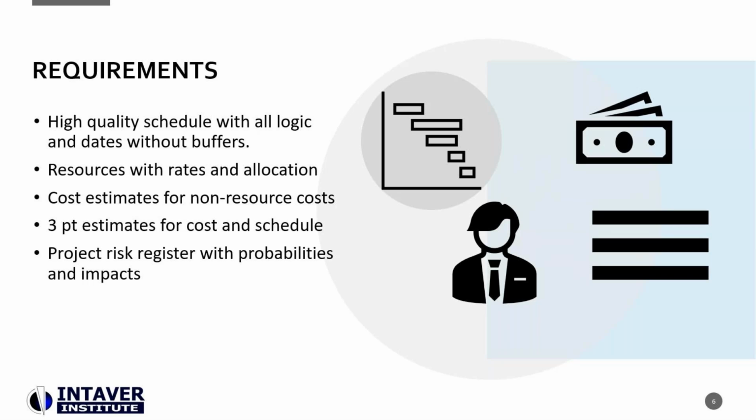We recommend, for what we call time-dependent costs, so time is money, using resources with rates and allocation, so a resource-loaded schedule, as part of the analysis. Then we'll use cost estimates for non-resource costs, or what we would call time-independent costs.